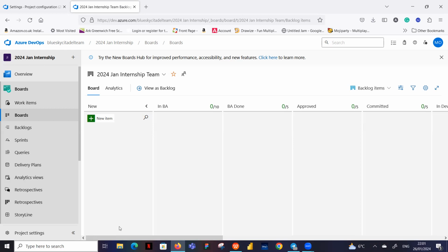Okay, that helps. She can even come, check the story, find out it's okay with her, and then tell the BA, I've checked out the story, they are fine, just move them to approved. And what approved is telling the team and the Scrum Master is, these are the stories that have been approved for us to work on in the next sprint. Okay, thank you. You're welcome.